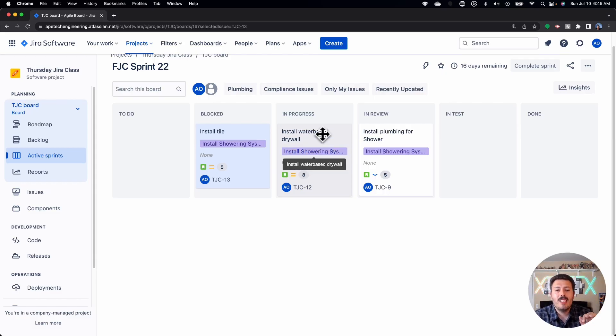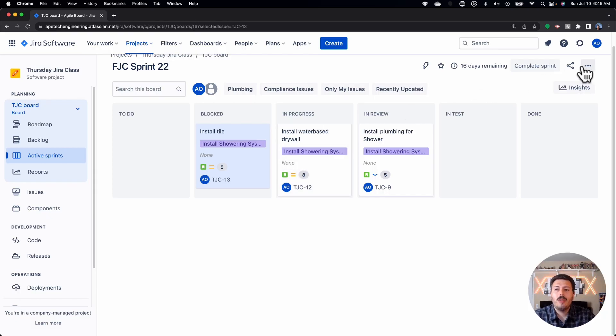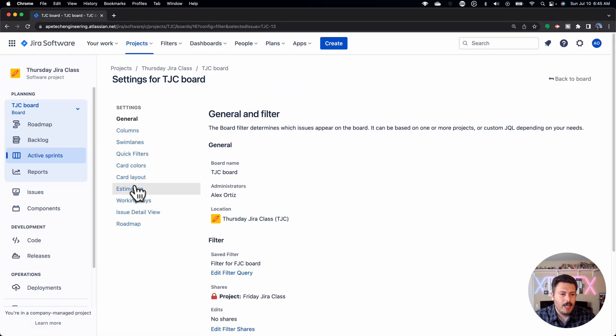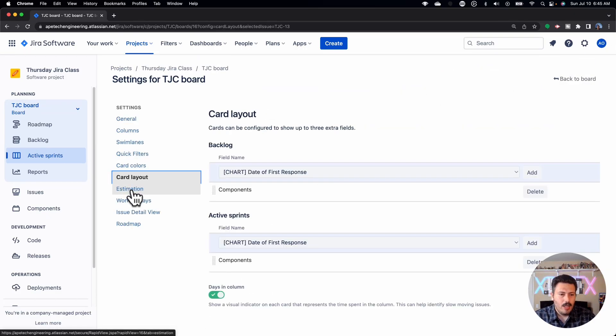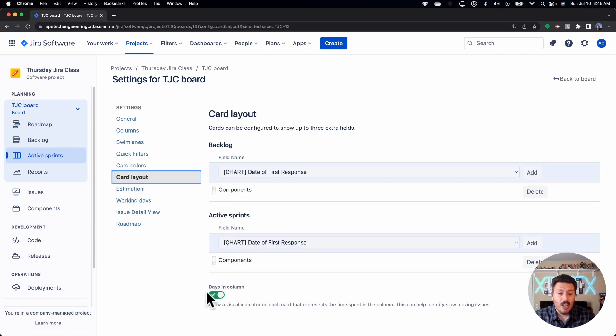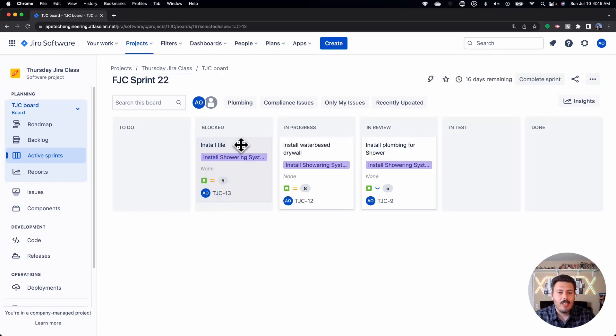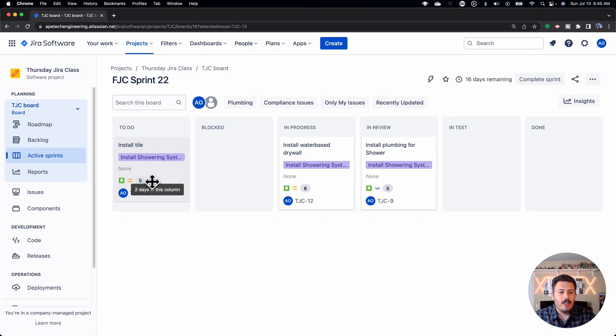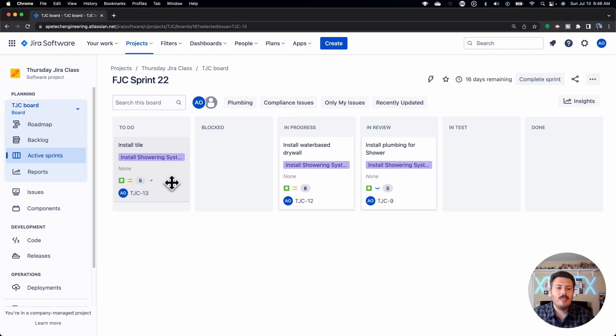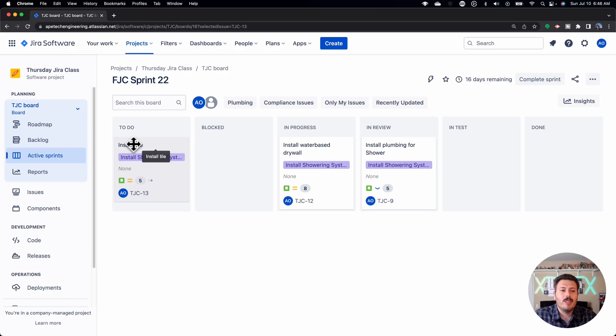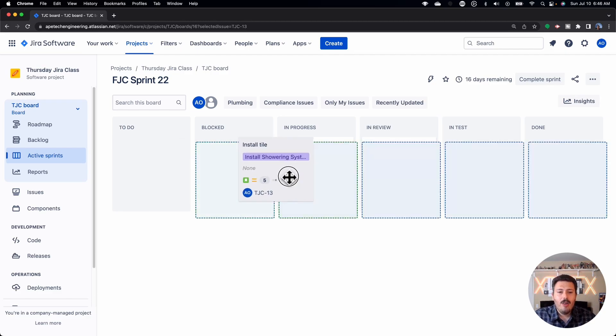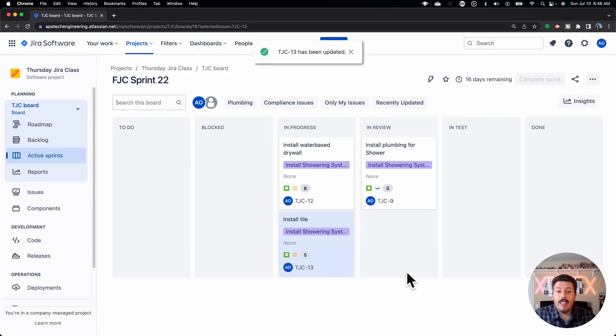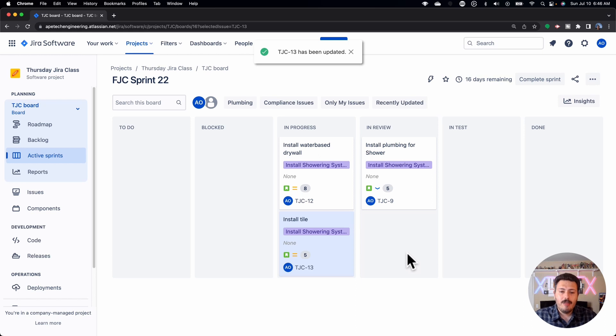One of the cool things you can do within Jira is if you come over to your board settings here on the right, you can come down to card layout, and there's a days in column section that you can toggle, and when you toggle that one, you're going to get a couple of dots, and it'll tell you how long, you see here, it'll tell you that this issue has been two days in this column. And so as you move them, and as time progresses, these add a couple of dots, and they turn red when you really need to go and focus on them. So as a Scrum Master, this is one key thing you're looking for, to see how your team's progressing, how they're trending, and if they need any additional help that maybe isn't being surfaced during your daily Scrum.